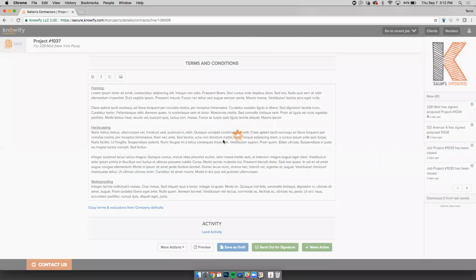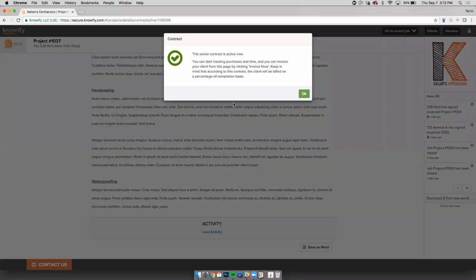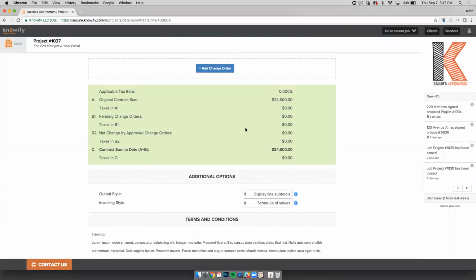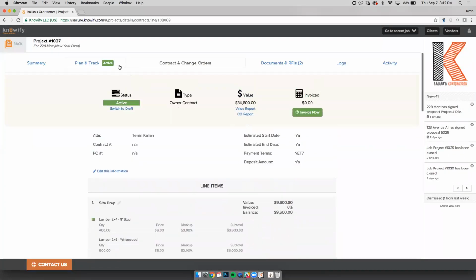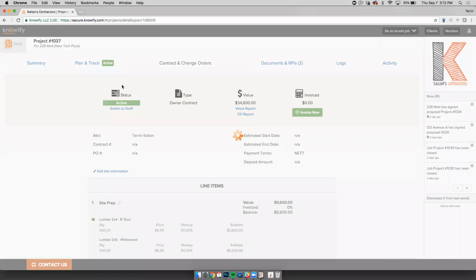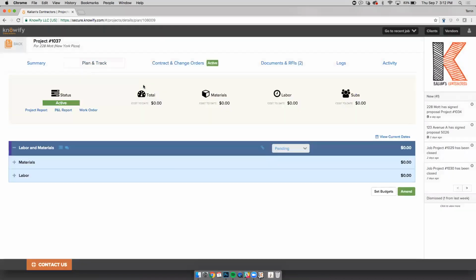Another update we made is for people who are using simple mode jobs. Traditionally, budgets have been saved for people who go through the professional style of job costing and entering a budget first. What you can do now is retroactively put in the budget after the contract's live.